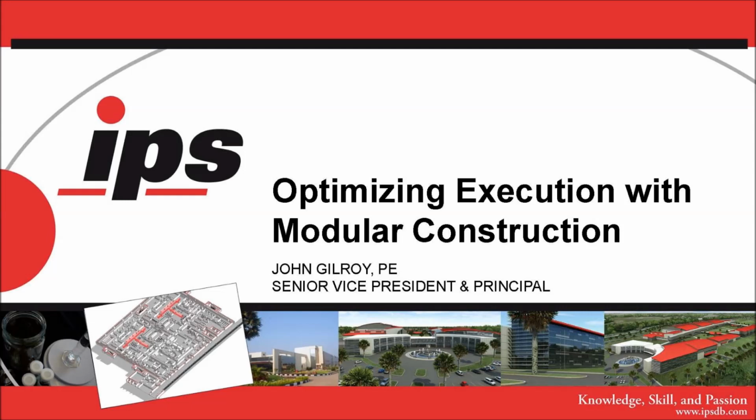Modular project delivery, summarizing, will reduce overall duration. You can get parallel activities done, and you have a favorable impact on the critical path, or time from decision to delivery. Again, a lot of facilities that we see, people say that I want to either build or renovate a certain area, but the layouts and systems are always changing, so it gives you the most time while you're building the shell to have impact to the internal fit out by using modular construction, modular wall systems, things of that nature.